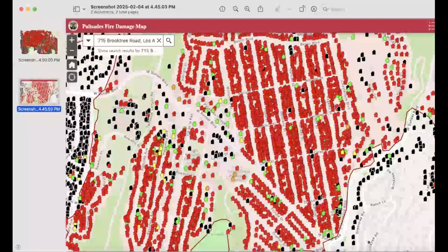But when I showed you the Larkfield and the Wickiup neighborhoods, the Wickiup one was the HOA one, and of course they wanted them to have a similar appearance, but it wasn't all cookie cutter. So the 80 that were done by Stonefield were 5 plans and 3 elevation styles.